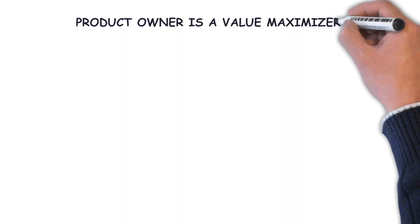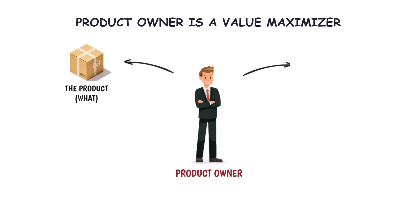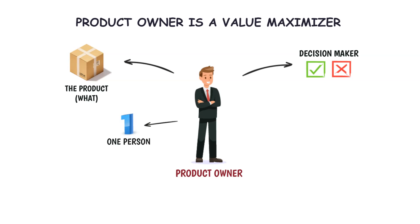The product owner is a value maximizer. A product owner is responsible for what will get developed and in what order. It works when everyone must respect the product owner's decisions. These decisions are visible in the content and ordering of the product backlog, and through the inspectable increment at the sprint review. The product owner is one person, not a committee.